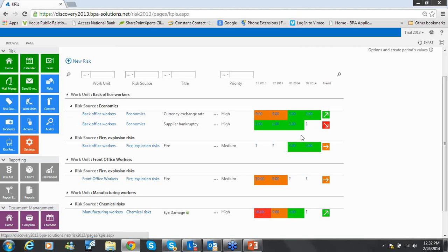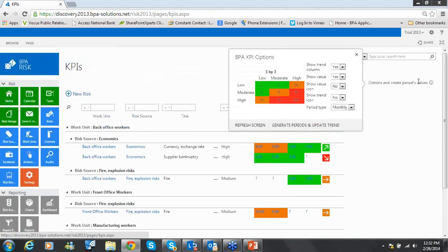Now, the way this works is we simply have various matrices that are either 3 by 3, 3 by 4, I think there's a 9 by something, and essentially when you take the impact times the probability of something happening in a given month, the outcome of that can be put against these numbers, which are something that you create, right, depending on what's going on.